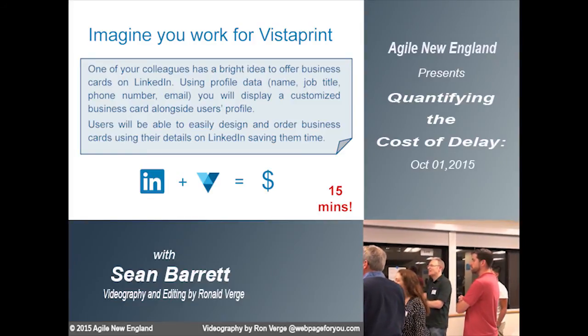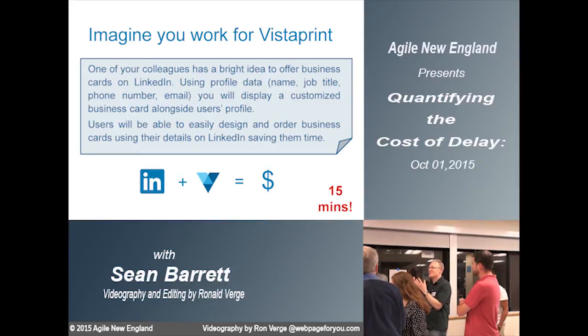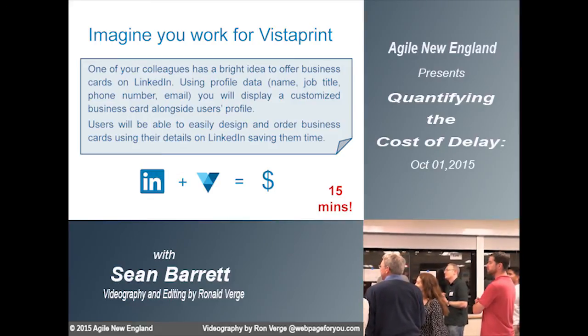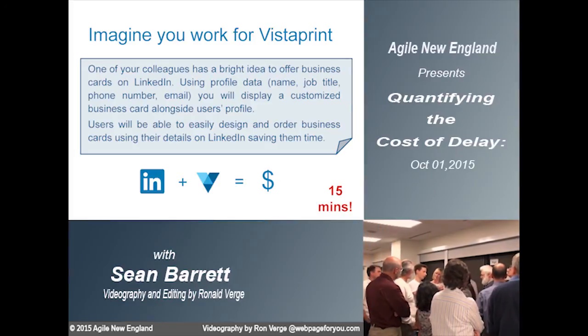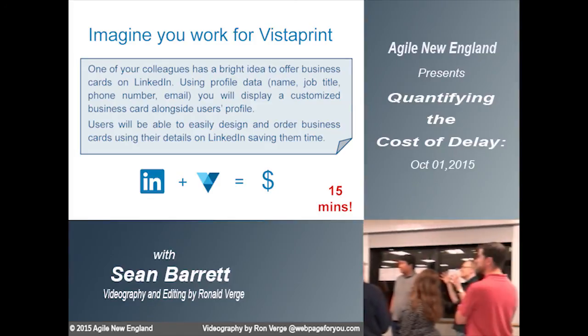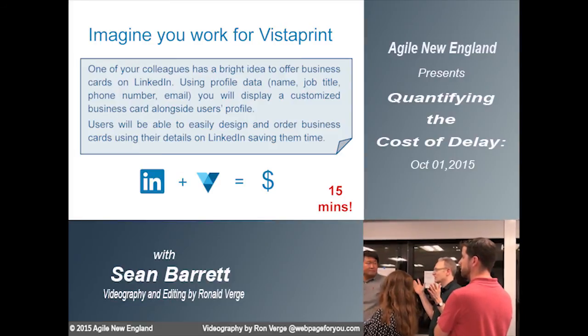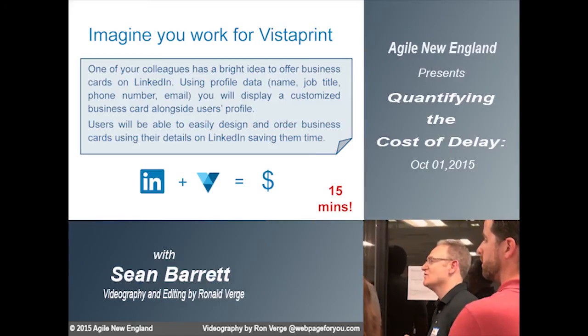If you do a Google ad link, AdWords, and then you do a very tiny experiment with this, and you just see what's the rate that you get for each one of them, and then the cost of the delay becomes the difference between those two. And in fact, it may not be profitable to do it at all. Interesting. So you're suggesting that one of the killer assumptions here might be the size of what you're trying to estimate. When you're trying to estimate it at all, like upfront prediction as opposed to just empirically trying a small, inexpensive experiment and then see what you get.